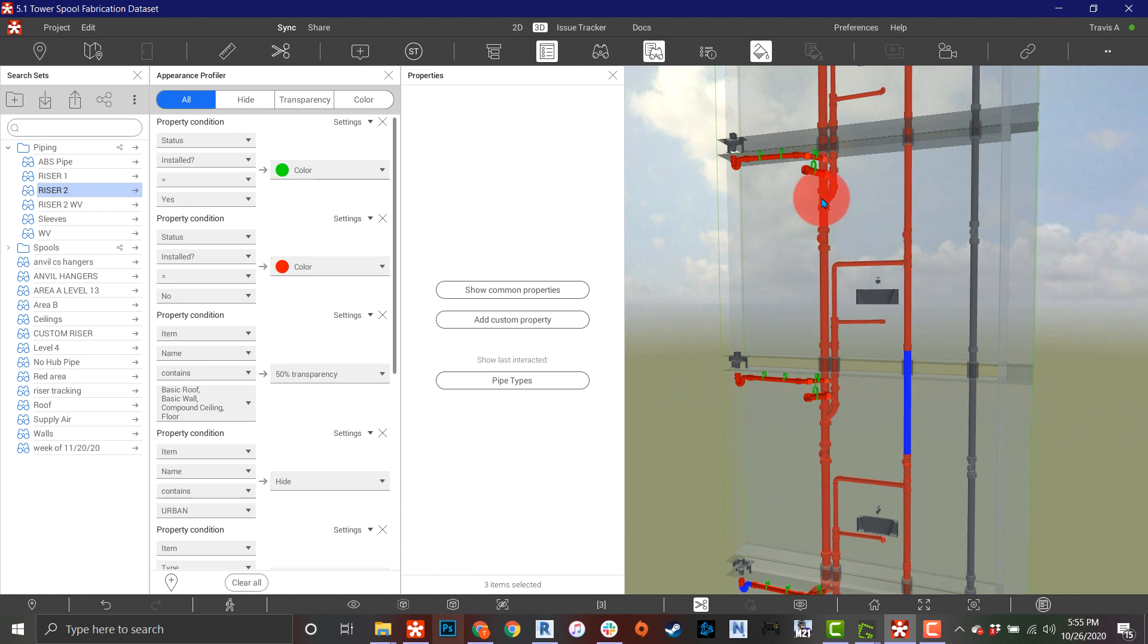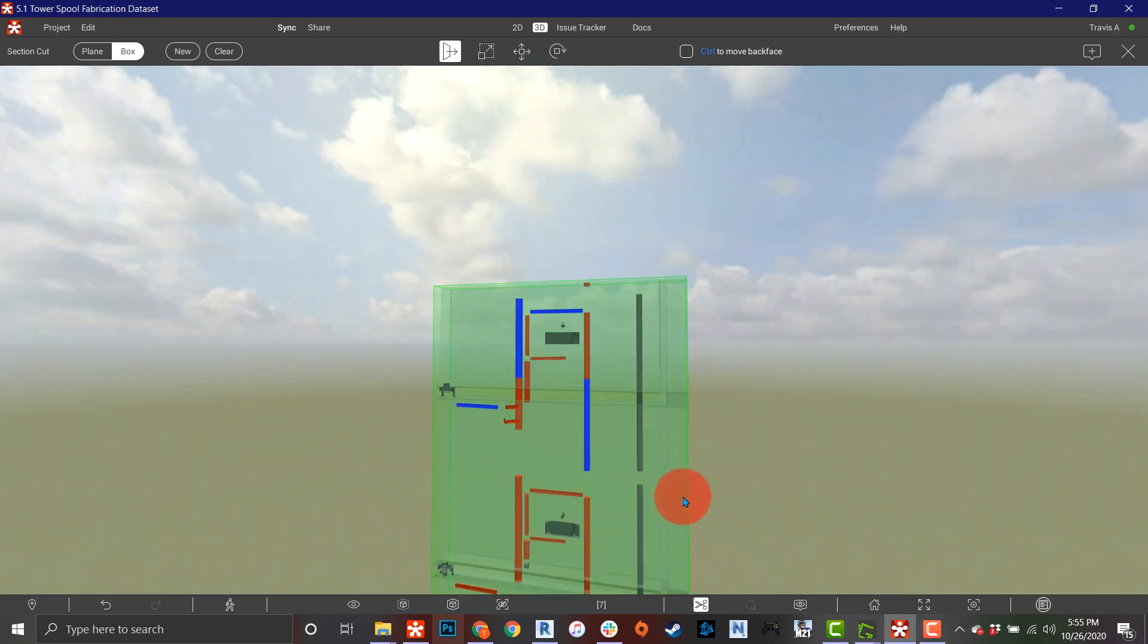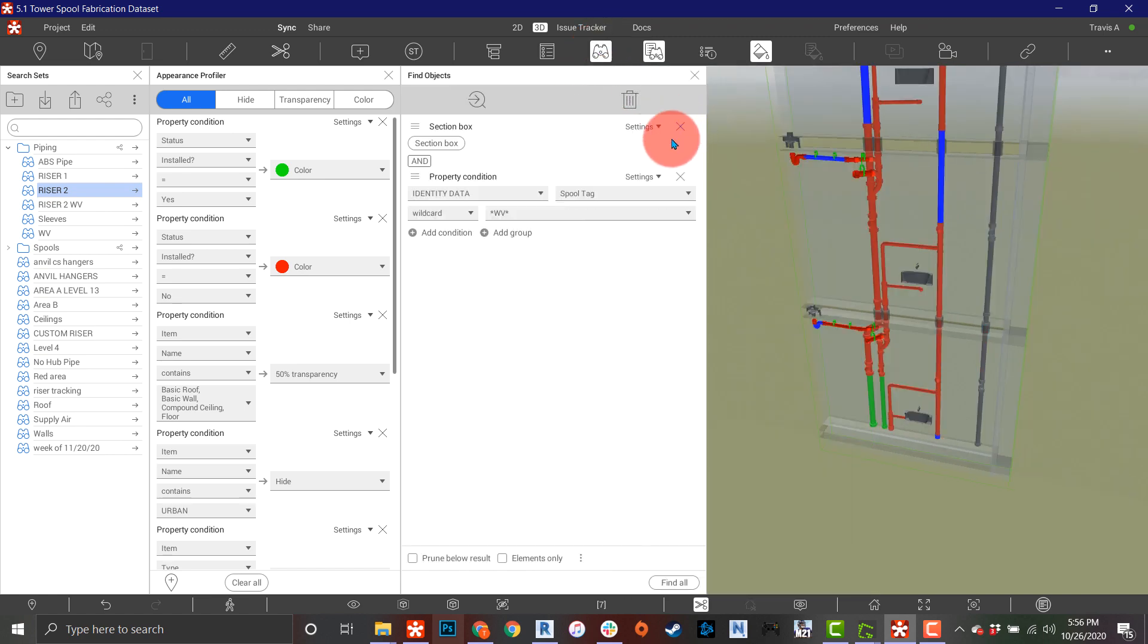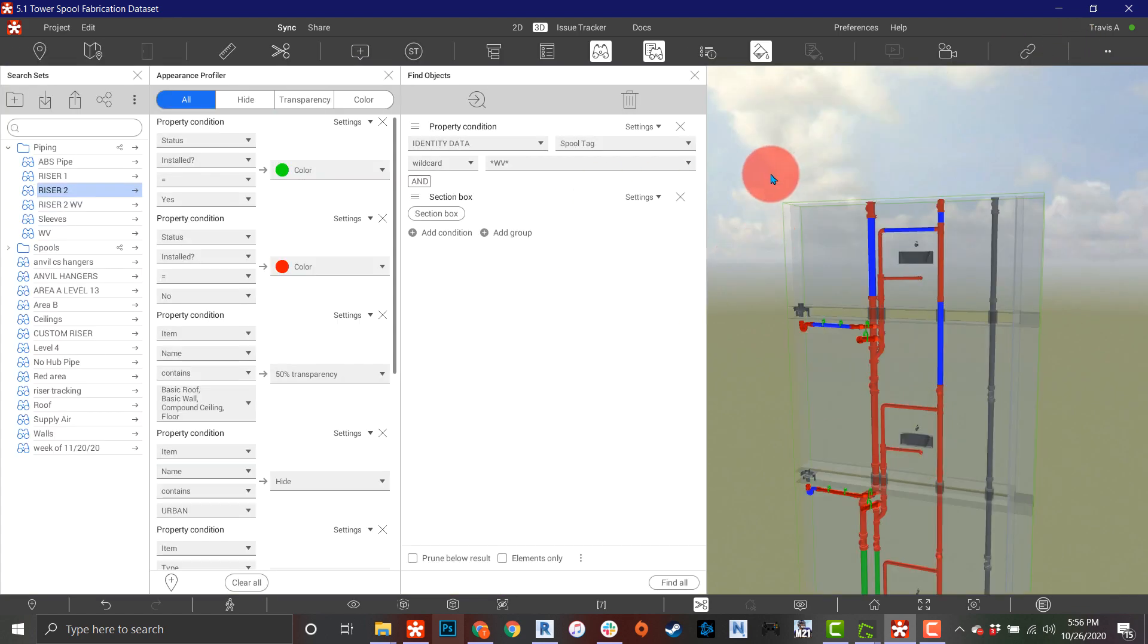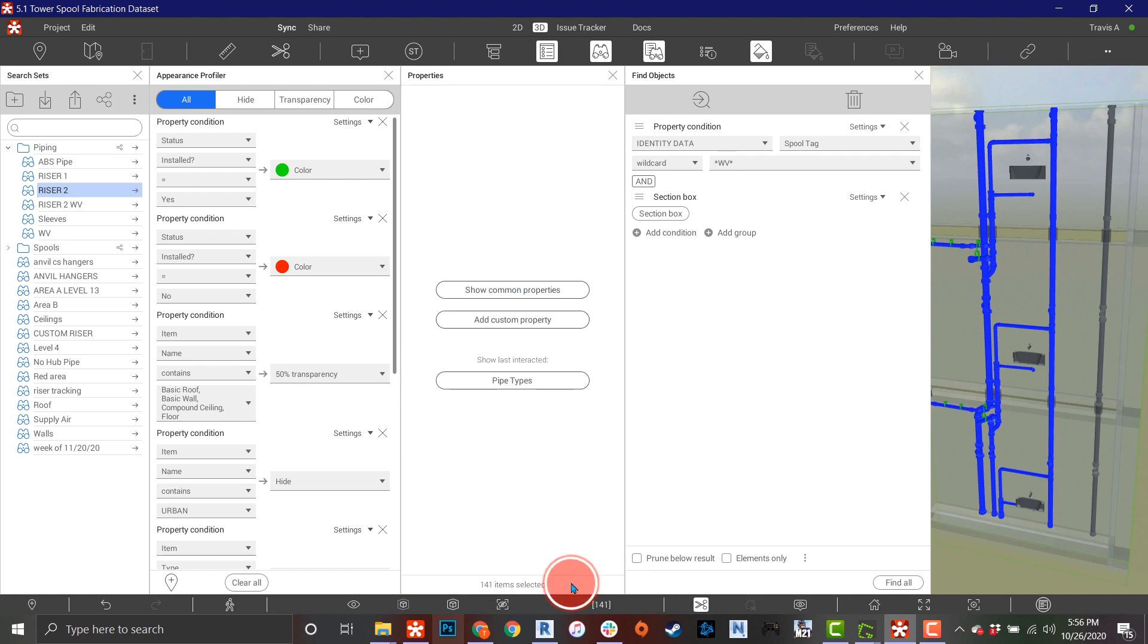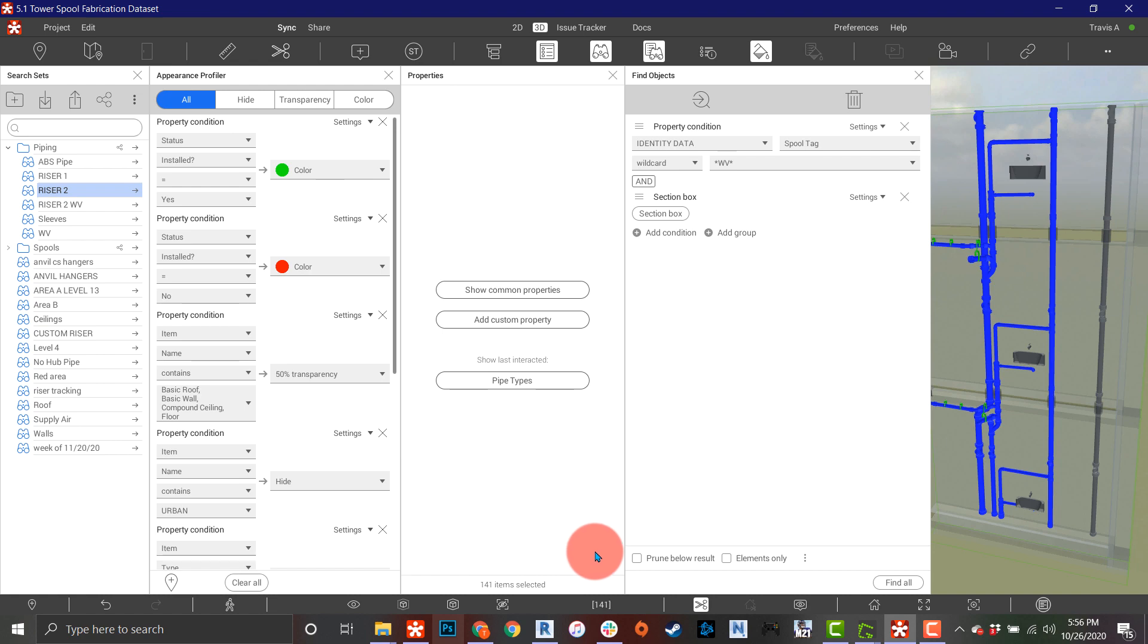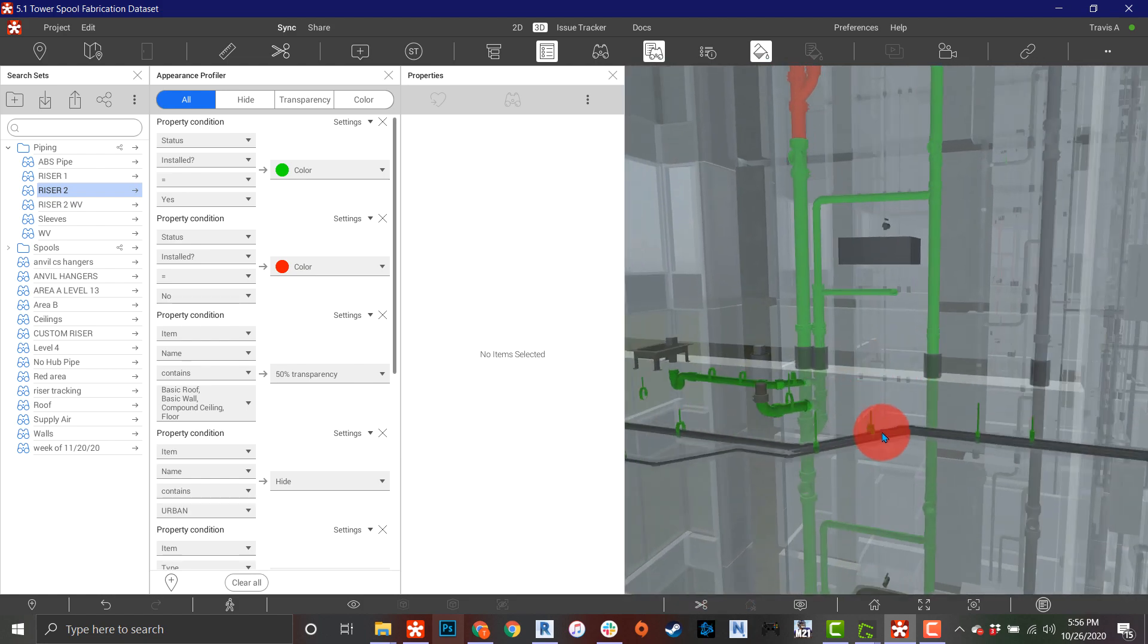Come up here and grab a few parts that they installed - maybe they got right up to this point. We're going to go ahead and do that, then I'm going to set up my section tool again. They can also crop this down nice and tight if they want, close that out, then do the same thing - drop your old section box out of here, add condition section box. It's going to use our new section box, say done, then I'm going to find all the waste and vent in this new section box. Come up here to my properties, show common properties, click here and make sure that property gets added. Say done, then I want to tweak this again so it gives me the option to apply it. Now you can see I just turned everything in there green. If I uncrop this, everything above that should be red.